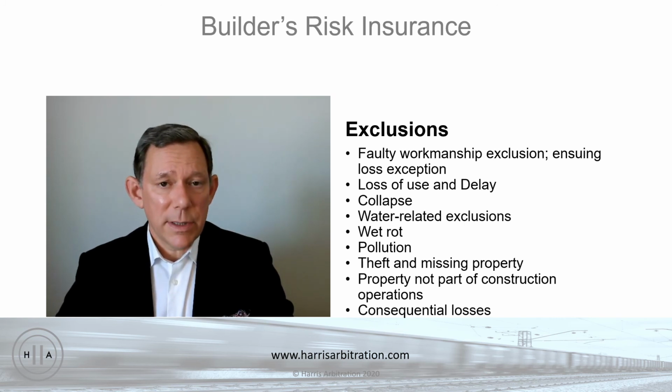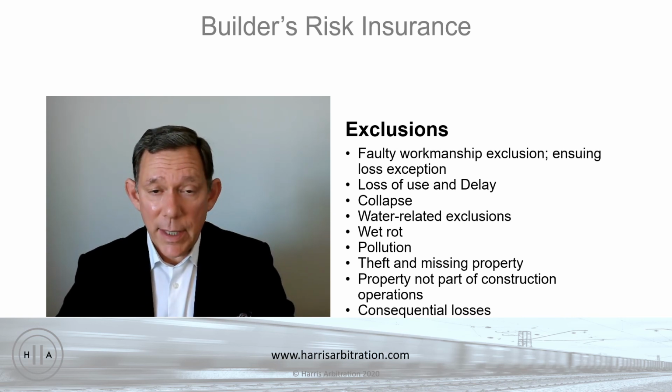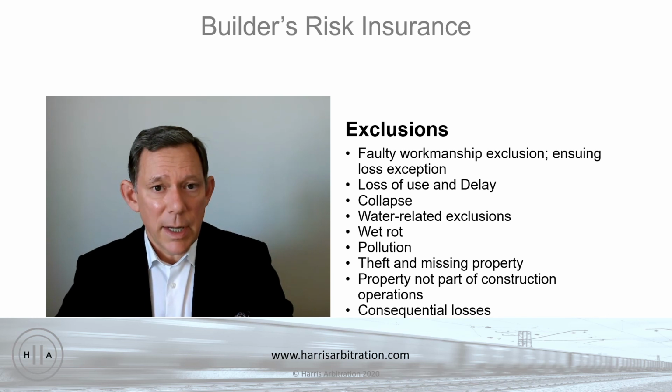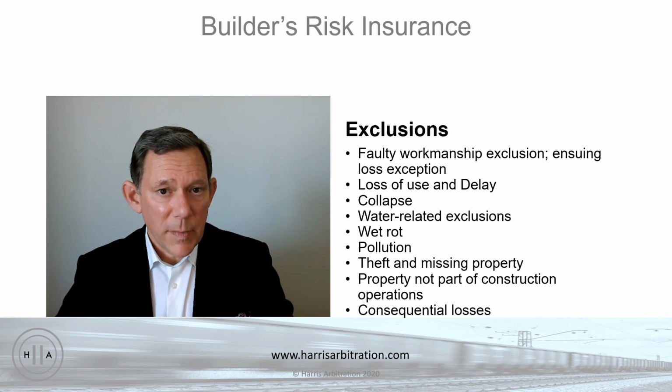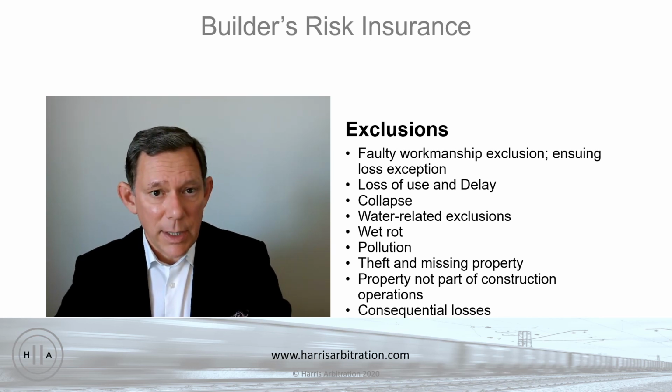And if somebody wants that kind of coverage, it's going to be in a separate policy altogether. So even though you might think that something would be covered under a builder's risk policy, for example, pollution, there are some things like pollution that are considered essentially business risks that either properly remain uninsured because the contractor or subcontractor, for example, should be able to control them, or if you really want to insure it, it's going to have to be under some other policy.